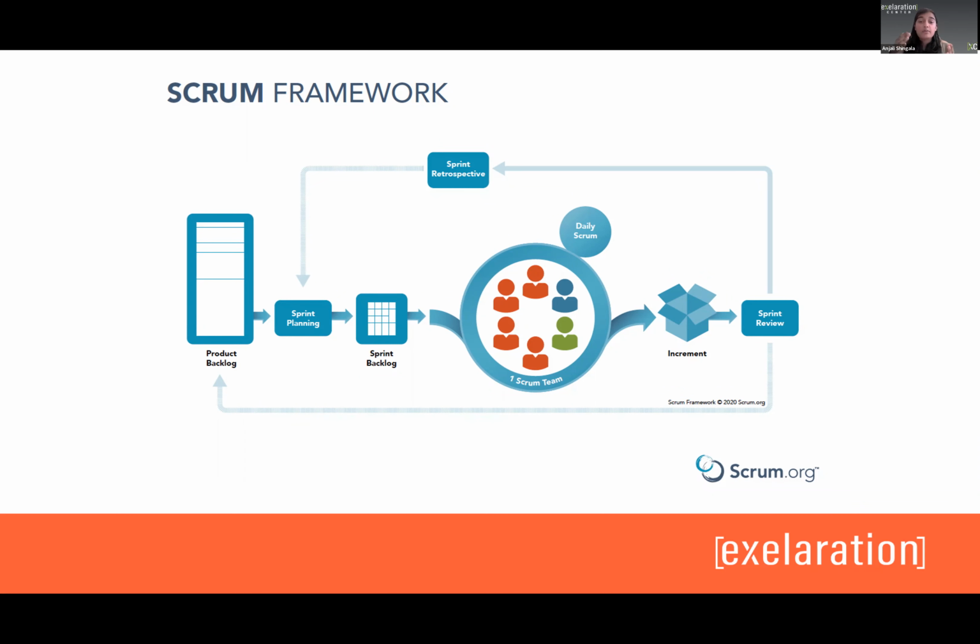In Scrum, we utilize what's called the daily Scrum. Daily Scrum is a 15-minute meeting in the morning to talk about what's going on, to align everyone on what progress is being made. The most common method that I have seen is a 3-bulleted method. 1, what did you work on yesterday? 2, what do you plan to work on today? 3, do you have any blockers?